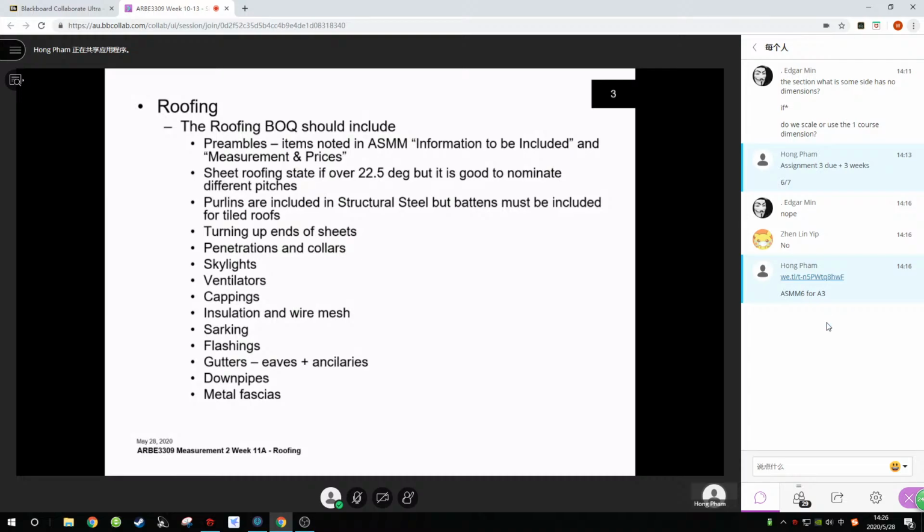If you mean that if it's fixed to something, that's included, you mean it to be included in the price. If you say "fixed to including furring channels", that's fine. If you say "including", that can be worked out. But if you mean "fixed to and including", make sure you use the word "including". Otherwise, someone like me will be scouring through your stuff and go, where are these?